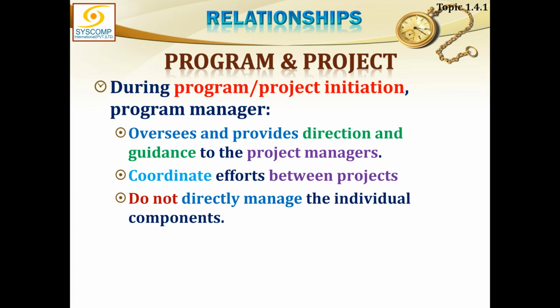I hope I said earlier, the program manager is responsible for developing the program work breakdown structure, and that will naturally link to the projects. That should not go down more than one level into the project.